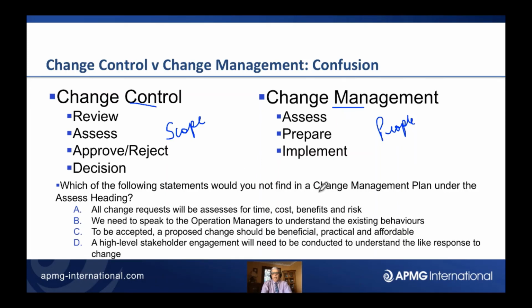So we've given you a little example here. Which of the following would you not find in a change management plan? Or you may refer to that as a change management procedure. Remember, change management is dealing with what's on the right-hand side. All change requests will be assessed for time, cost, benefit, and risk. That is an incorrect statement. You would not find that in change management because that is part of change control. So that will be one of the correct answers.